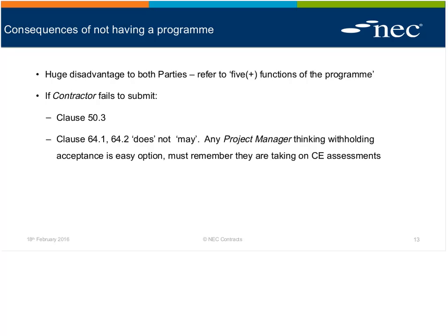I also think, though, that as much as the contractor doesn't want to rely on the project manager to make these assessments, I bet you the project manager doesn't particularly want the task of doing that huge amount of work as well. If the project manager fails to do replies, then it becomes compensatable. And I think that even with a low degree of creativity, you could put together quite a robust case that not having this program brings such uncertainty around what's going on that, as a contractor, I'm disadvantaged big time.